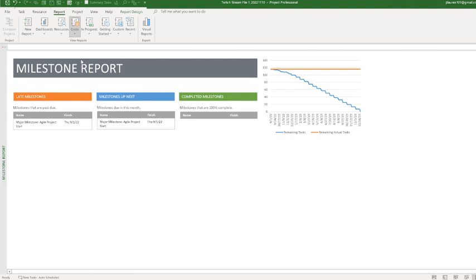So that takes your schedule variance, schedule performance index, cost performance index, and compares that to your BAC. Oh, someone's dog was barking outside. Anyways, that will be able to compare your budget, which is your BAC, your budget at completion, or also your planned value, right? Then you have resource cost overview, which is how much it's costing per resource.